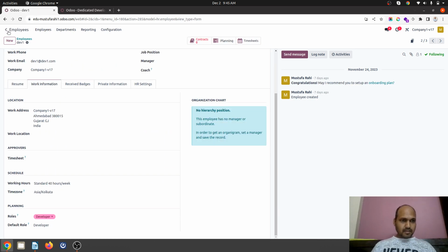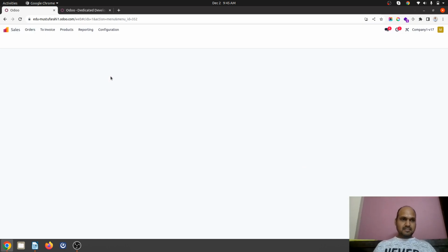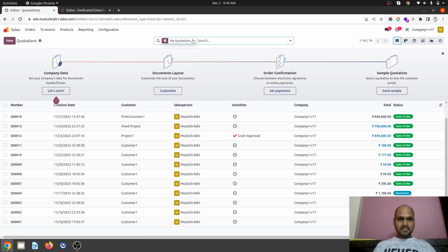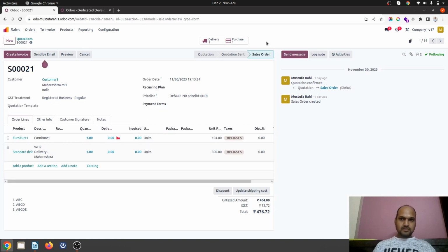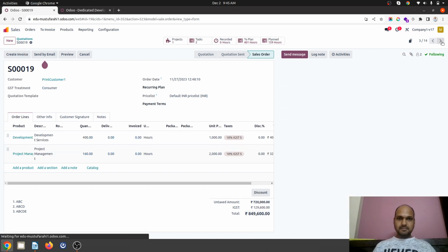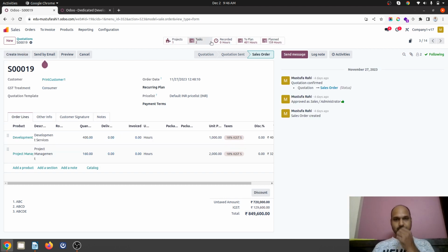Now moving on to how exactly this will help. To give you a high-level idea, inside my sales orders I have multiple sales orders, and some are in terms of project. This is the plain sales order, and this is connected with my project and task. You can see I have sold 400 hours of development service and 160 hours of project management services, so in total it tells me 560 hours of services to do. And I have planned 159 hours at the moment, considering SO19.